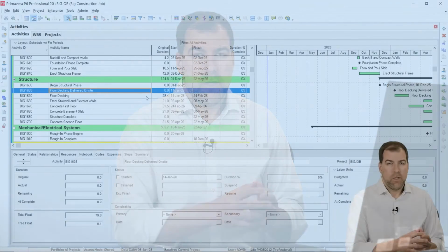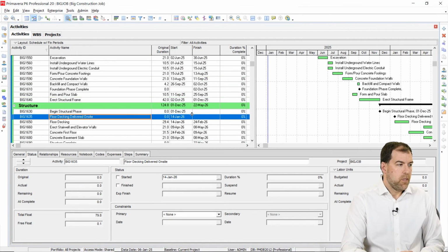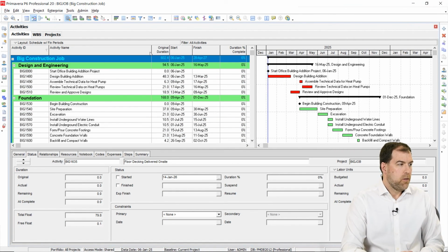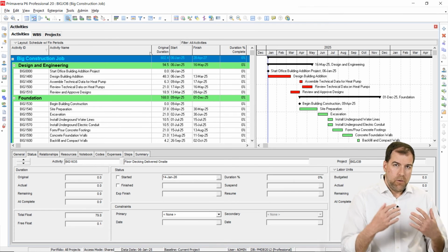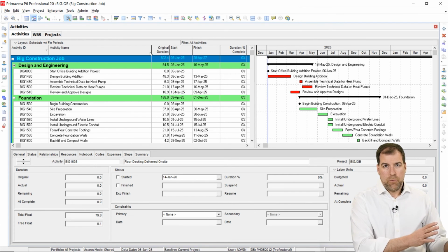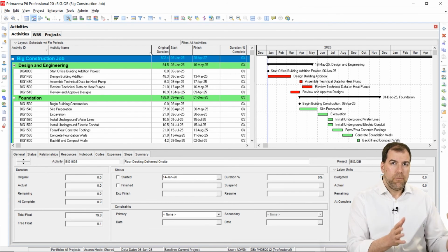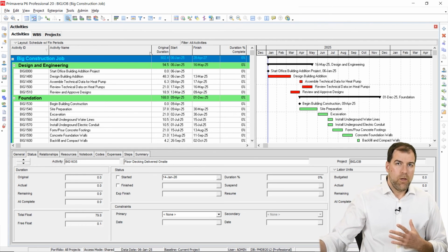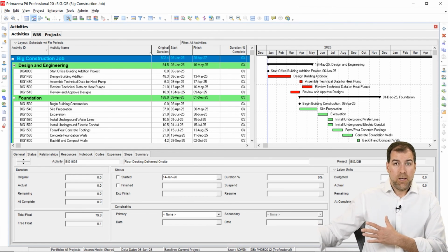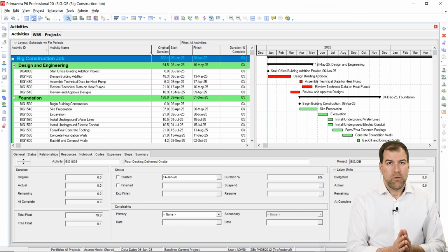The other thing is, like I said, these relationships are hard to find visibility on, okay? They're not super obvious that I have links between schedules. That being said, if you're in control of both schedules, then you're probably safe, okay? But if you are handing off control of another schedule to an outside entity, I would really think this one through a little bit.